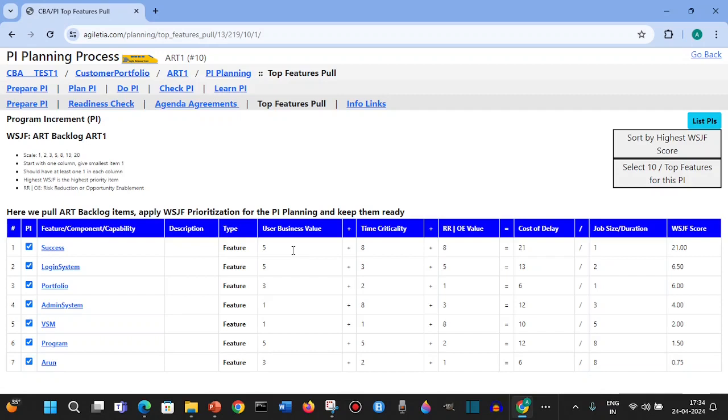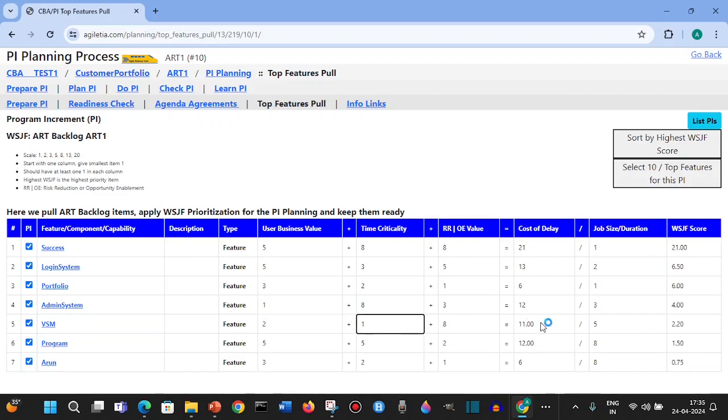These features will be pulled and we will apply the WSJF prioritization. All the help is given here like SAFe is giving these instructions. If you want to change this, for example if you want to change this to R2, this will automatically change the score.